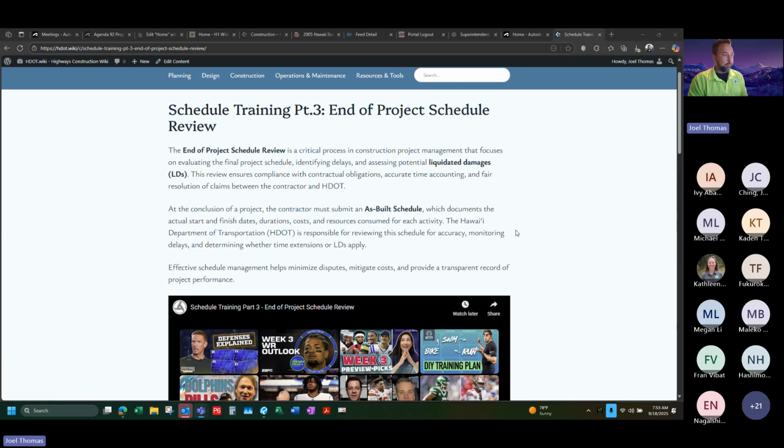I would just say, probably the most important thing is keeping track of your delays as they're occurring in your project. That's the easiest way to do this. If you're waiting until the end of the project, you're setting yourself up for hardship trying to figure out what happened and when. My recommendation would be, even if you're in the middle of your project and you haven't started doing this yet, to zero in on where you're at with contract time remaining, and then come up with some sort of log that is tracking.